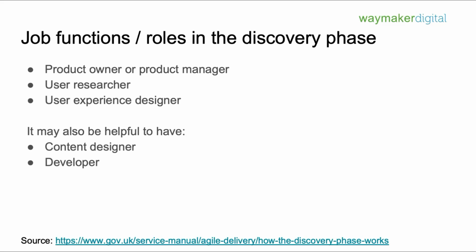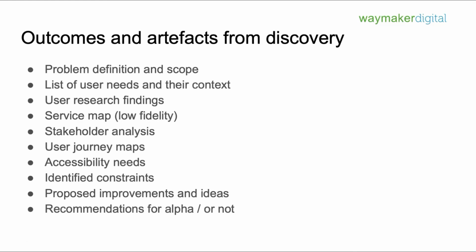You may also find it helpful to have a developer or a content designer in your team. But again, the basic job roles that you most likely will need in discovery are the product manager, the user researcher, and the user experience designer.